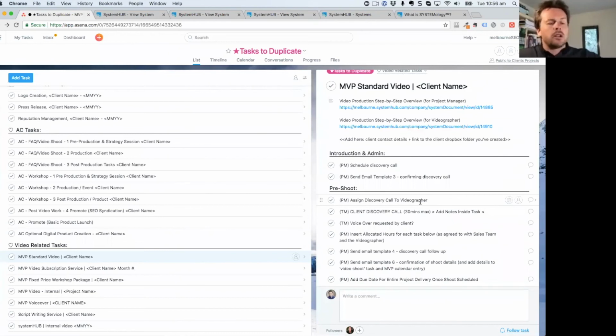I see some people try and systemize it too much. I saw that with, actually, it might be a mutual friend of ours. I don't know if you know Troy Dean, but he had set up an in-depth process around podcasting, and he was using Podio that triggered each of the next different steps. And then the problem was when you go full automation, usually that means no one's actually watching what happens. Yeah. If something then breaks down, three weeks goes by and someone goes, why didn't that actually get done? Oh, it got stuck here. Whereas I think that project manager role is key. Yeah.